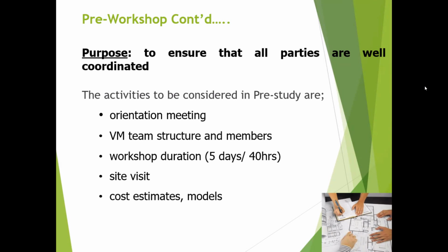So they can do an initial cost estimate, then they can establish the cost saving ratio, right? So originally, if you don't apply value engineering, the cost is this much, right? Then through the activity, how much you want to reach.